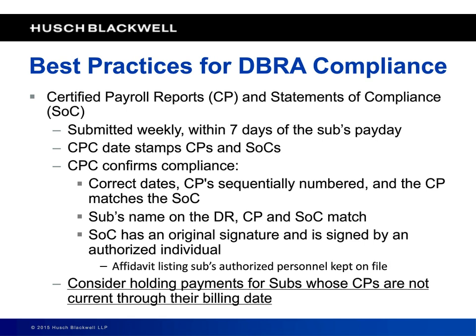They're going to make sure that the sub's name matches the name on the 1413 form, that statement of acknowledgement that we talked about, that the same sub matches the daily record, the manpower report or daily report or force report, whatever you choose to call it, and that it matches the name on the statement of compliance. Why is it important? Because this is where you run into situations where your sub will have these lower tier subs that you never knew about. And all of a sudden you get a certified payroll for somebody that you hadn't heard of.